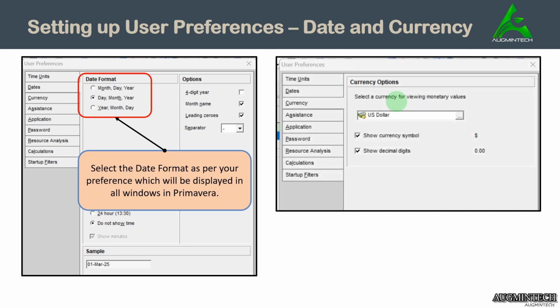And then currency, as I mentioned, it depends on the geographical area where the project is, and the funding that is coming into that project from different entities or different countries, whatever it is. In that case, you select the appropriate one, so that the conversion rate while you are doing it in P6, sorry, outside Primavera or within P6, will be a unique one.